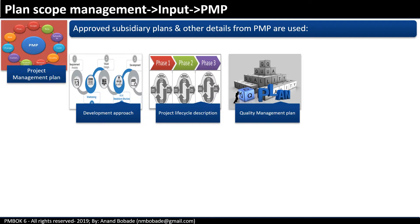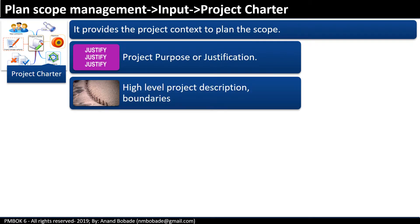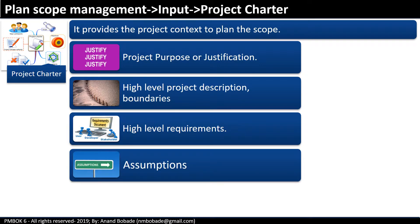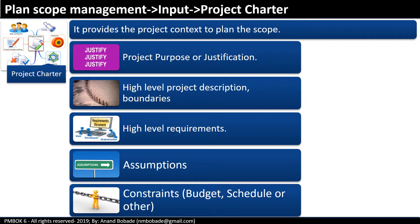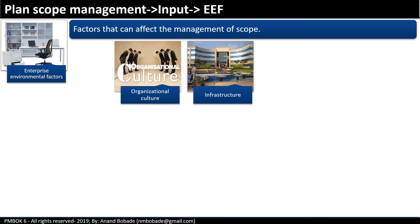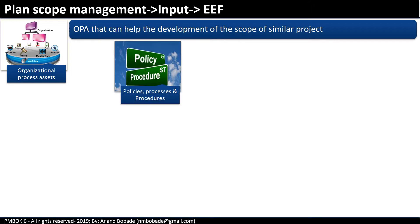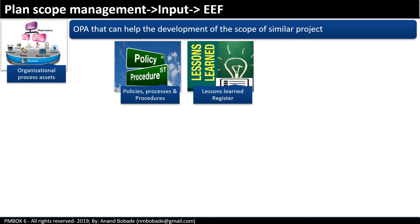The scope covers the completeness of the work, but the quality management plan covers the correctness of the work. The project charter provides the project context to plan the scope. Relevant parts include: project purpose or justification, high-level project description, boundaries, high-level requirements, assumptions, and constraints related to budget, schedule, or other areas. An organization's culture and infrastructure are among the enterprise environmental factors that can affect scope management. Organizational process assets such as policies, procedures, historical information and lessons learned repositories may help guide the development of a scope management plan.